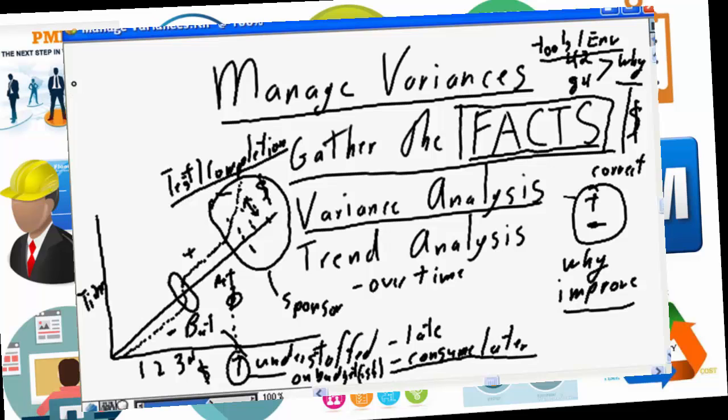And then I would write my status report that says, looks like, probably a better term than that in your actual formal status report, we're over budget, and here's why. So manage the variances, don't be Chicken Little, don't say, we're under budget, hooray, hooray, hooray. You understand why. Don't be Chicken Little that says, oh, all of a sudden I'm spending more than baseline. I know why I'm spending more than baseline, because at this point in time,